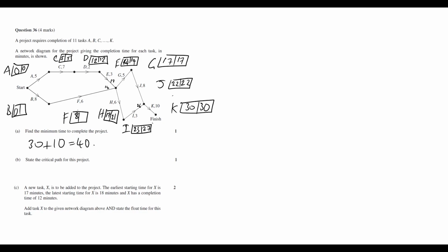Okay, so now for the lower path, well, what about part F? Well, for F, we can start at 8, but if we also started that at 11, it would actually be perfectly fine. Just remembering that we need to finish that by 17, so if it takes us 6 minutes, we can start it at the 11th minute, and then finish at the 17th minute to continue down this network here. All right, and then continuing on, we can also start B 3 minutes later than we start A. There we are. So now we have the complete time managed network here.